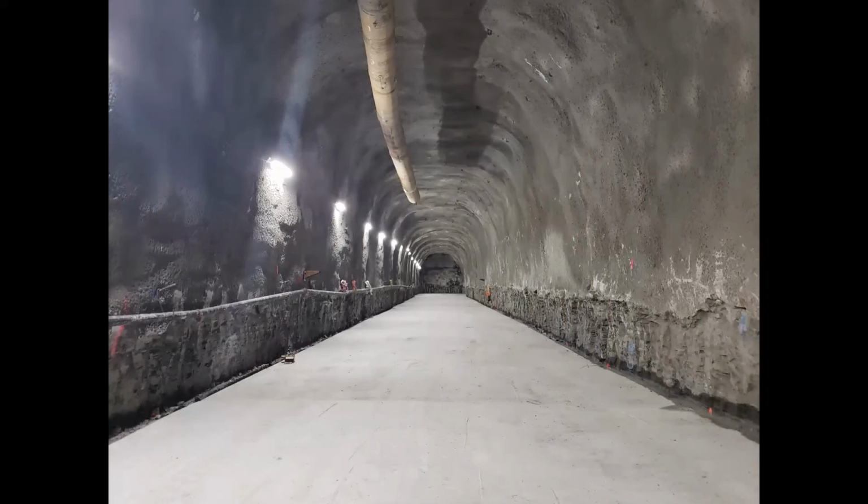Excavation of the starter and tail tunnels was with a road header. And the top-bottom bench rock support was installed by utilizing an electric drilling unit. And then shotcrete was applied by utilizing an automated shotcrete sprayer. So, fancy stuff. And I'm just going to zoom into the front of the starter tunnel now.